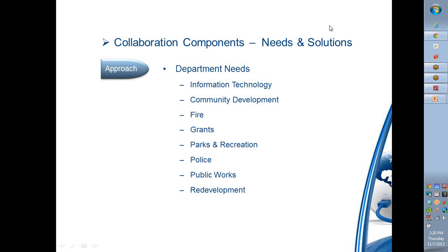So we decided that we were going to have basically 3 staff members. One was going to be a project management level person. We're just going to go by billing rates. We're not going to look at hourly salaries here. But our project manager is going to be at about $75 an hour, and our 2 technicians are going to be at about $50 an hour.